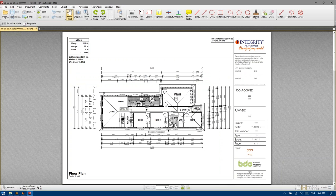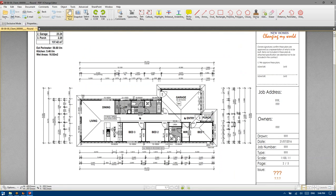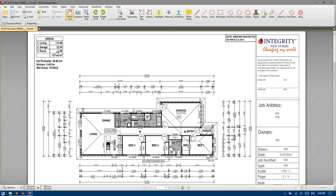This area here will be the total square meterage of the slab that is to be poured. Now, in an instance like this in a highly reactive soil type H2D, it's very likely that we'd use a polyvoid fully suspended slab system. In that instance the porch would actually be poured in situ since it's load-bearing and carrying the roof. It would be quite problematic if it was poured as external concrete and moved differentially and tore away from the actual roof structure. So we want to put this whole 137.42 in.